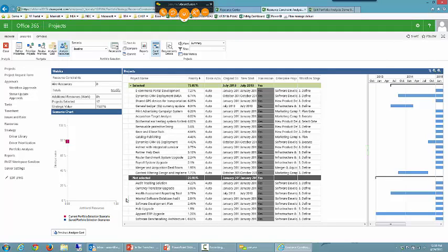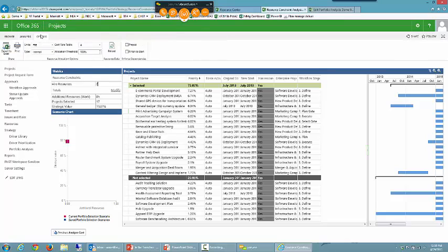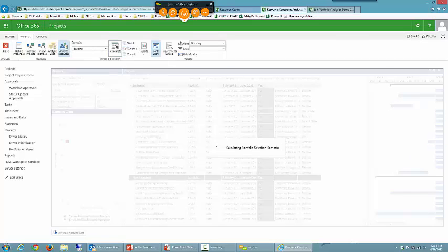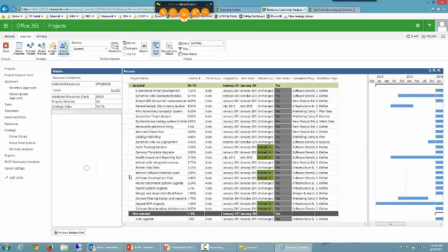One thing that I didn't have quite enough time to show you is the ability to model headcount in here. So I played around with start dates and I used the force in to get a project selected. You can also say, what if we hire a couple full-time people? Or if I go up into the options menu, I can change full-time to just contractors. And what if I throw an extra 75 grand at this and hit the recalculate button and see if that has an impact on which projects I'm able to do. So either throwing more dollars at it or hiring individuals, I can see what impact it has.